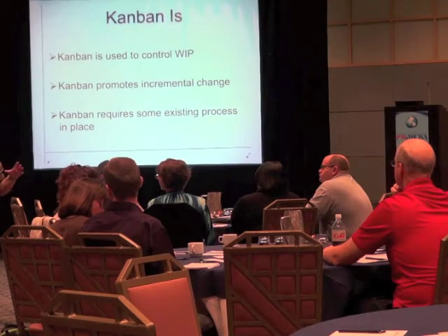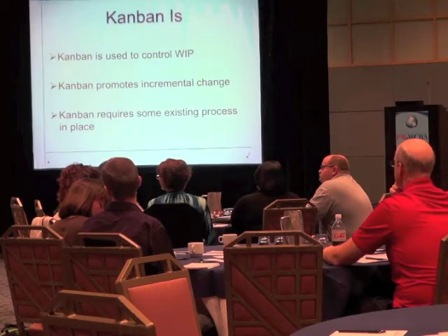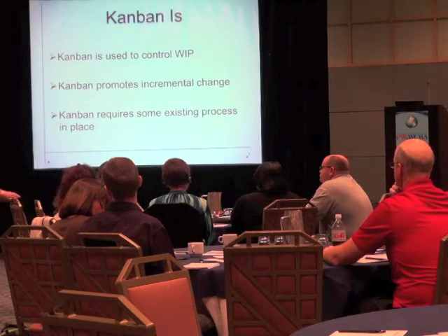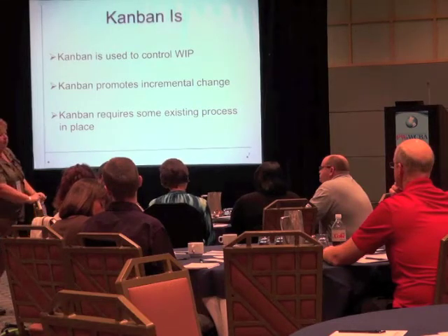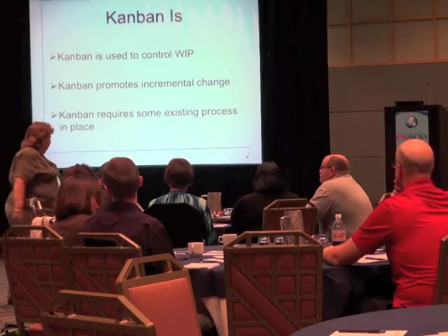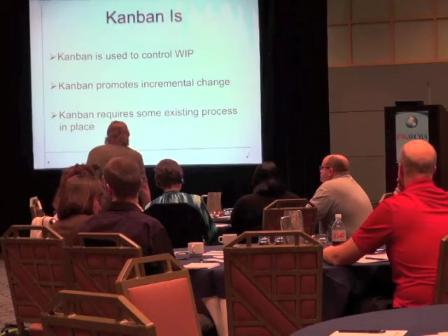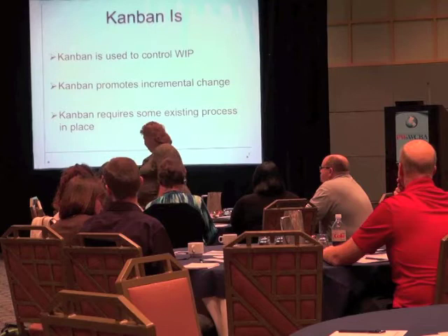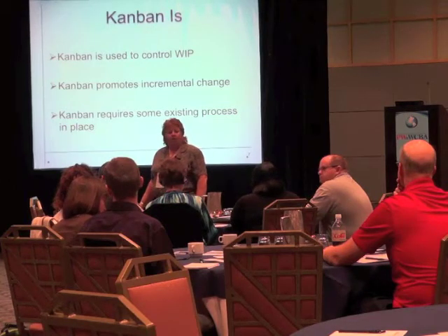So in that scenario I just described, where you had the 4 stages and the 3 buffer queues, the stages are the work being done, right? The buffer queue is where work is waiting to be done. And what you want to do is limit how much work you can have in a buffer queue, and we're going to get into that in just a little bit. I'll draw up some examples. Good so far?